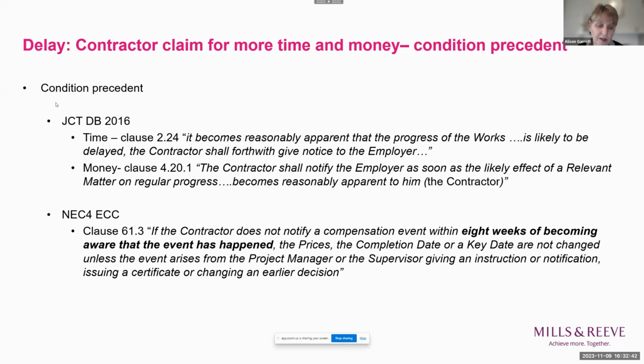If there's a deadline, and if there's an indication about how the party fulfills the deadline and what the consequences are if the deadline is not met, they are also indications that you might be looking at a condition precedent. A party might have to take certain action, failing which it loses its right to claim for any delay, time and money caused by delay, which is not its responsibility or risk.